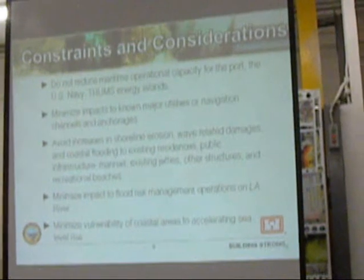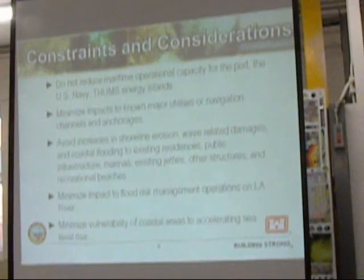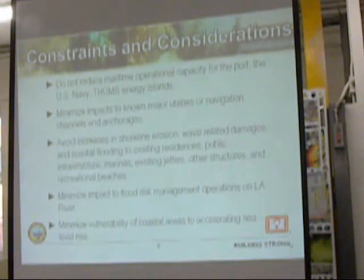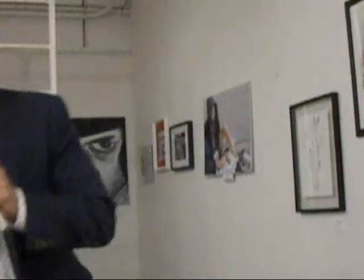There are some constraints and considerations that are important to frame the context of the study as a whole. We can't reduce the maritime operational capacity for the port, which includes the U.S. Navy and the Tums Energy Islands. We also want to minimize impacts to known major utilities, navigation channels, and anchorages, avoid any increase in shoreline erosion, wave-related damage, coastal flooding, and public infrastructure. We also want to minimize impacts to flood risk management and minimize vulnerability of coastal areas.